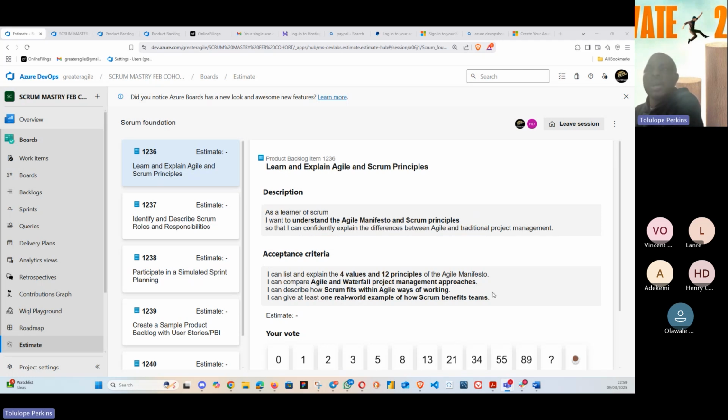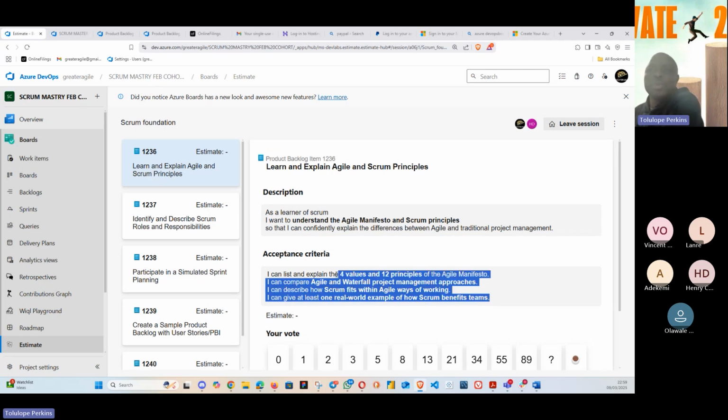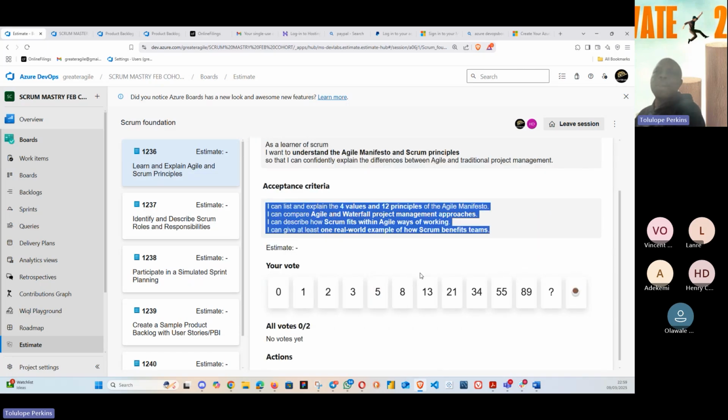How long will it take you to be able to do this? In my organization, though it is not the ideal thing, we have assumed one story point to be a half day's work, 2 story points to be a day's work, and so on. Anyway, this is not tied to time.